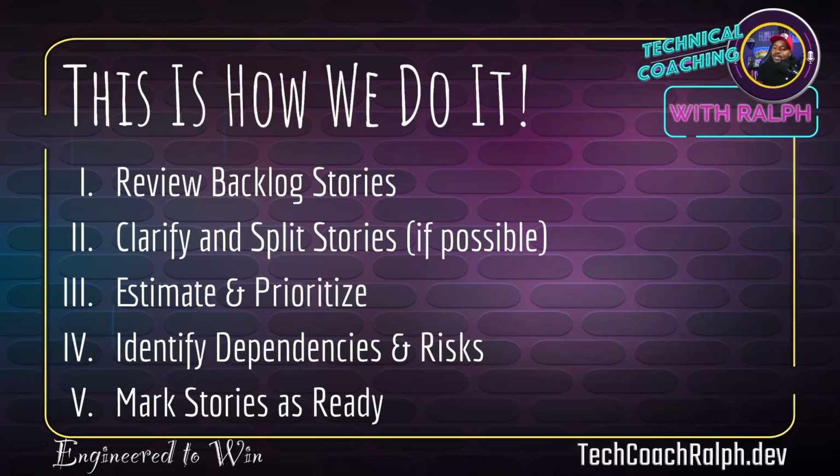For example, you can have something shipped and deployed, and it's working, but the definition of done is actually we need to be capturing some statistics on how this is performing. So it's not done until you do that.